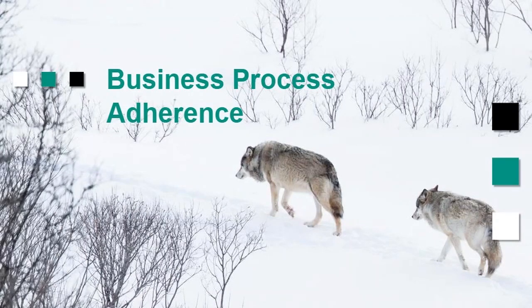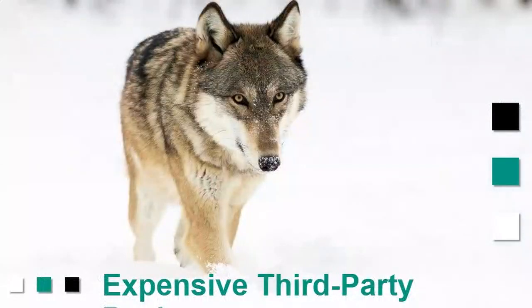Okay, so I have some clients that use this flag inside of P6 called the primary resource. They use it specifically for a variety of metrics, reports, etc. So that is something that we can add to monitor, make sure that there's always a primary resource. Okay, so things like that. And then that way you don't have to have such expensive third-party reviewers. You may still have some reviewers, right? But it's going to be a bit more streamlined is really what we're looking for.